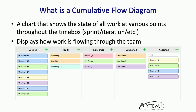I like to see all of that bundled up into an in-progress state, which does have some implications in that development and tests need to be happening simultaneously. There are no substates here, so the team will have to be working on everything all of the time in that work step. The cumulative flow diagram is my favorite metric — it is a very quick visualization to show you how work is flowing, and I like the anti-patterns that can be identified when we look at these.